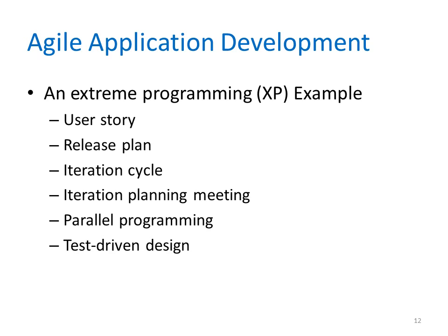User stories are implemented in a series of iteration cycles. An iteration cycle includes planning, designing, coding, and testing of one or more features based on the user stories. At the beginning of each iteration cycle, which is often 2 weeks long, the team holds an iteration planning meeting to break down the user stories into specific tasks that are assigned to team members.